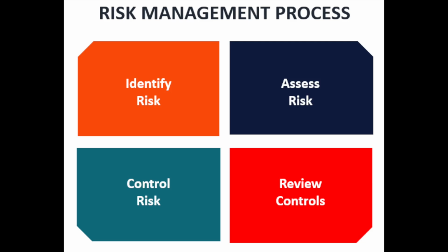Totally fine. But the next box here, review controls, this is basically just establishing how we as project managers and as a project team are going to review risk throughout the life of a project. Are we going to have a weekly, bi-weekly, monthly call to go through this list? Does the project sponsor prefer just to have a bi-weekly email containing the highest likely risk?